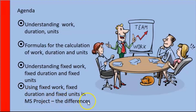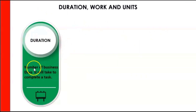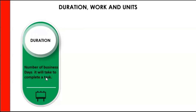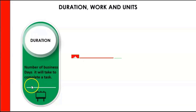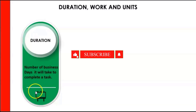So let us look a little closer at these three concepts. The first is duration. What is duration? It's the number of business days it will take to complete a task. So if duration is two days and you start on Monday, it will finish on Tuesday. But if you start on Friday, it will finish on the following Monday, because it is really dealing with business days — the working needs.